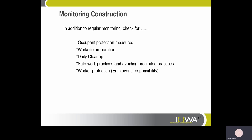Monitoring Construction. In addition to regular monitoring, check for occupant protection measures, work site preparation, daily cleanup, safe work practices, avoiding prohibited practices, and worker protection, which is the employer's responsibility.